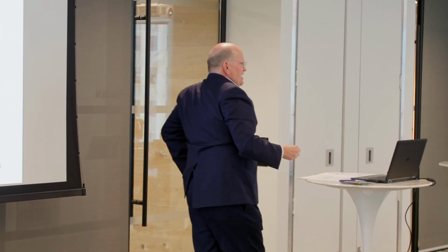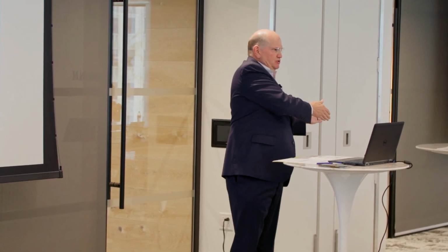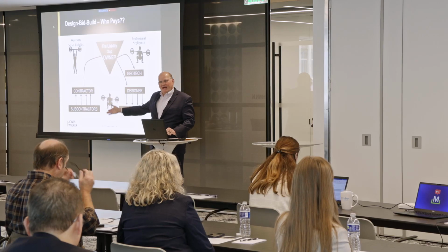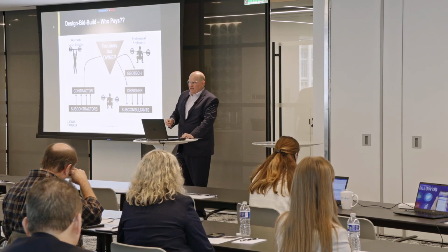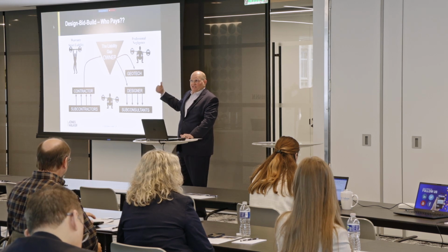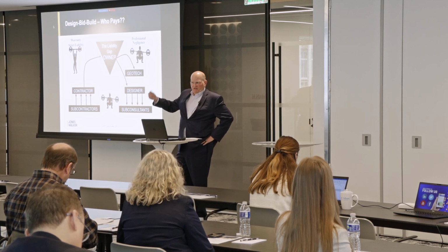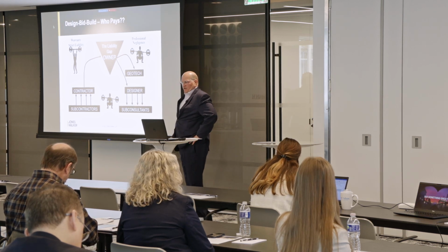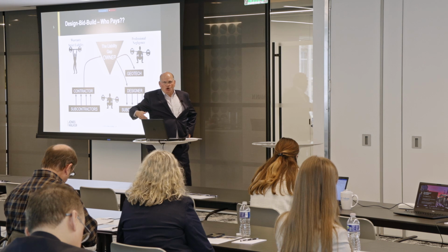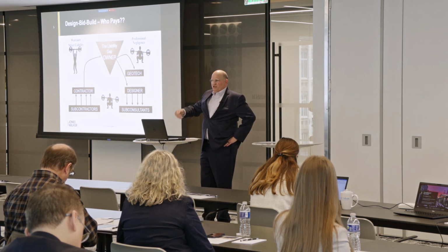So what does that mean? In a design-bid-build situation, the owner is sitting in a liability gap where it could absolutely have liability to the contractor under the implied warranty of the plans and specifications, but it cannot pass on that liability to the designer, because although there was a defect, the defect did not rise to the level of a breach of the standard of care. And then the owner holds the bag. And again, remember, you read any E&O policy, the standard for coverage is what?